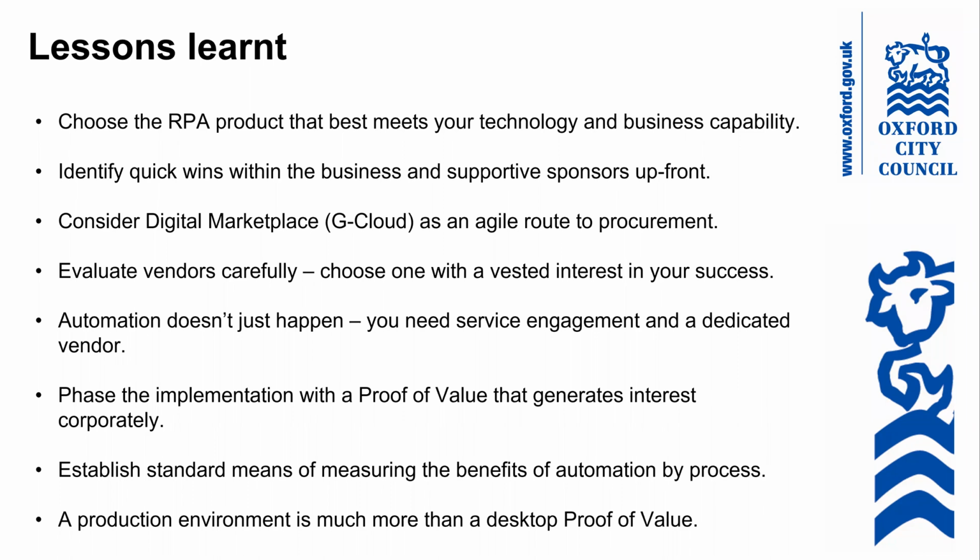And finally, the other lesson we've learned towards the end of this process, and we're still in the conversation with T-Impact, is that whilst using the community edition is pretty straightforward, you stick it on a laptop that's got enough memory and you batch process and run your processes by pressing a button. When you move to the full production environment, which has got a cloud component with the orchestrator, and it's got either in your data center or an on-prem component with a server and so on and so forth, there is a little bit of extra effort that needs to be put in to get the production environment up and running. Not a lot, but it's slightly different to the community edition.